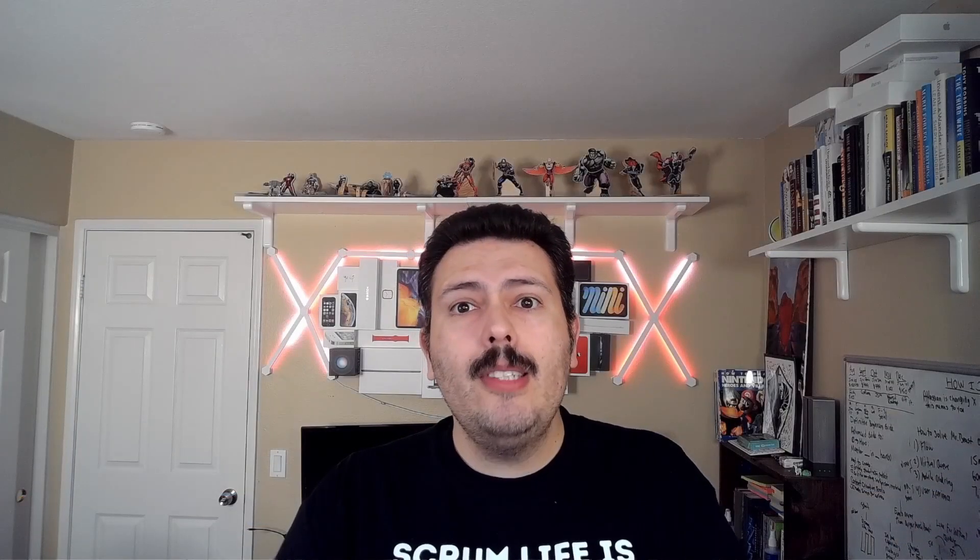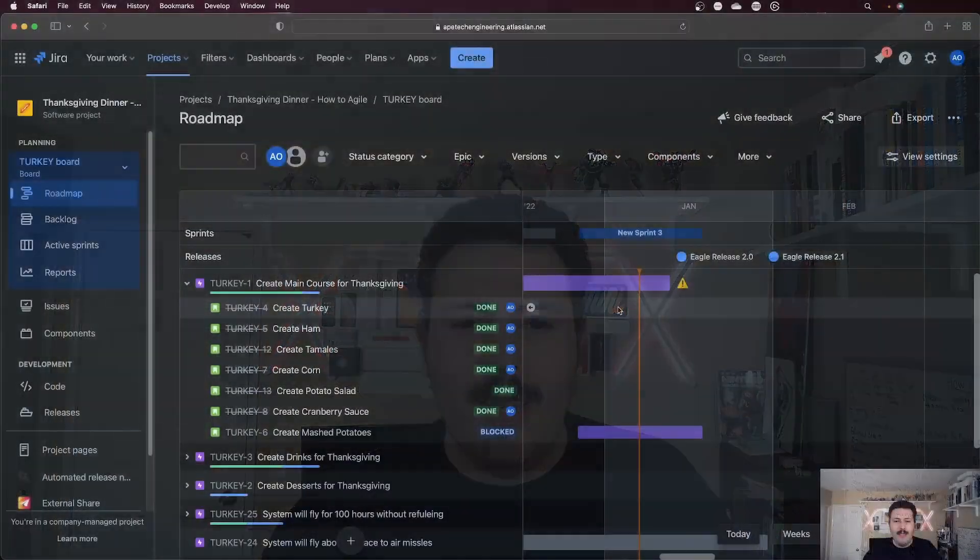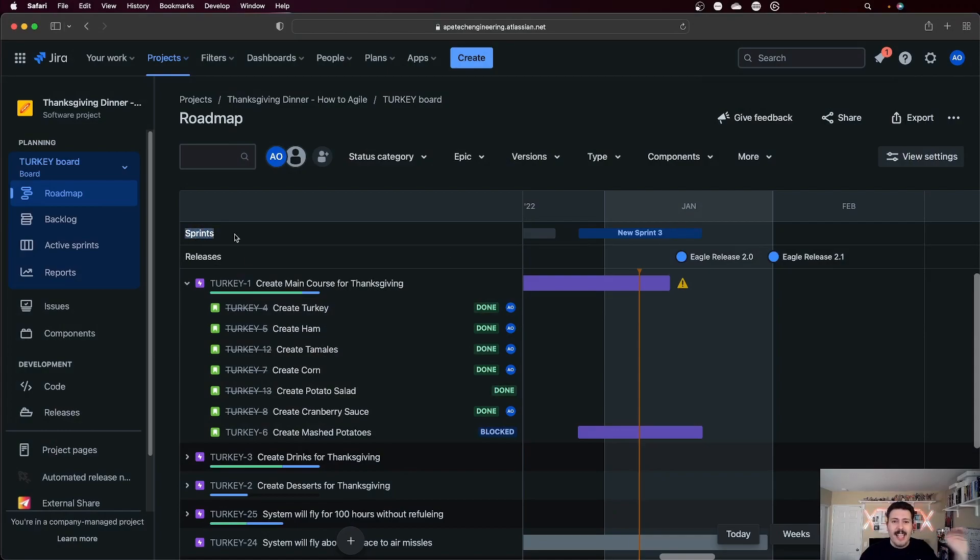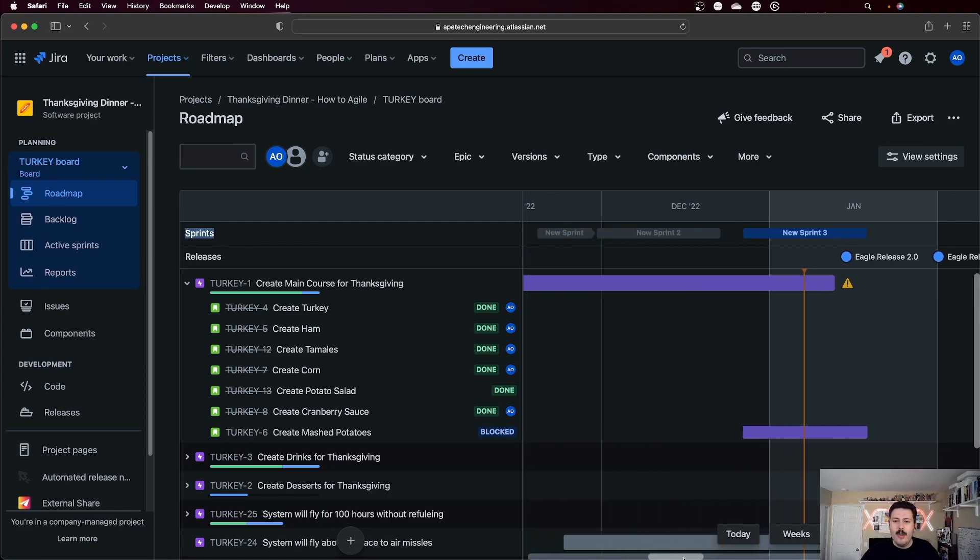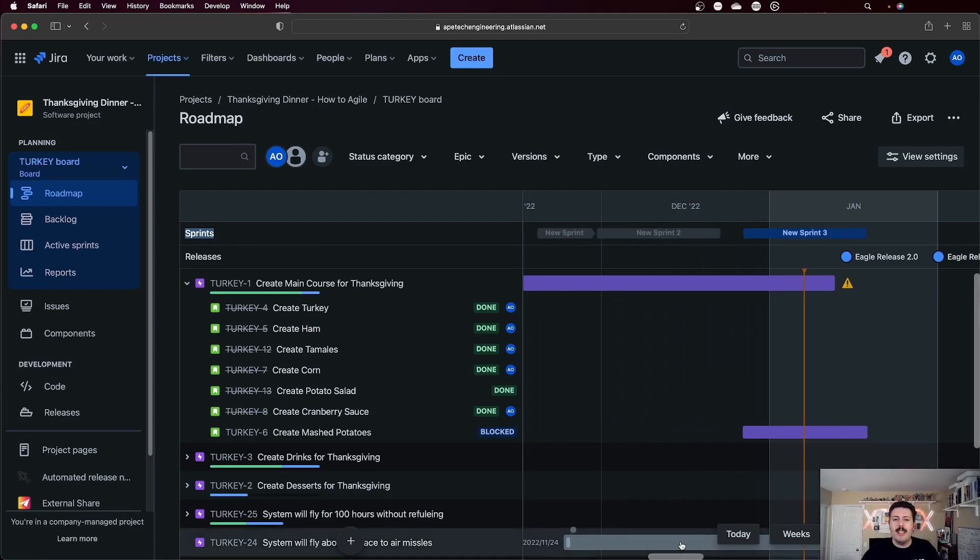And this is for a good reason. This is for a really, really good reason because you shouldn't be putting start and end dates on your stories because guess what the start and end date is for every story naturally. You guessed it, the sprint. And if you look closely, you're going to see that there's a sprint section up here. It's a dedicated row just for the sprints.